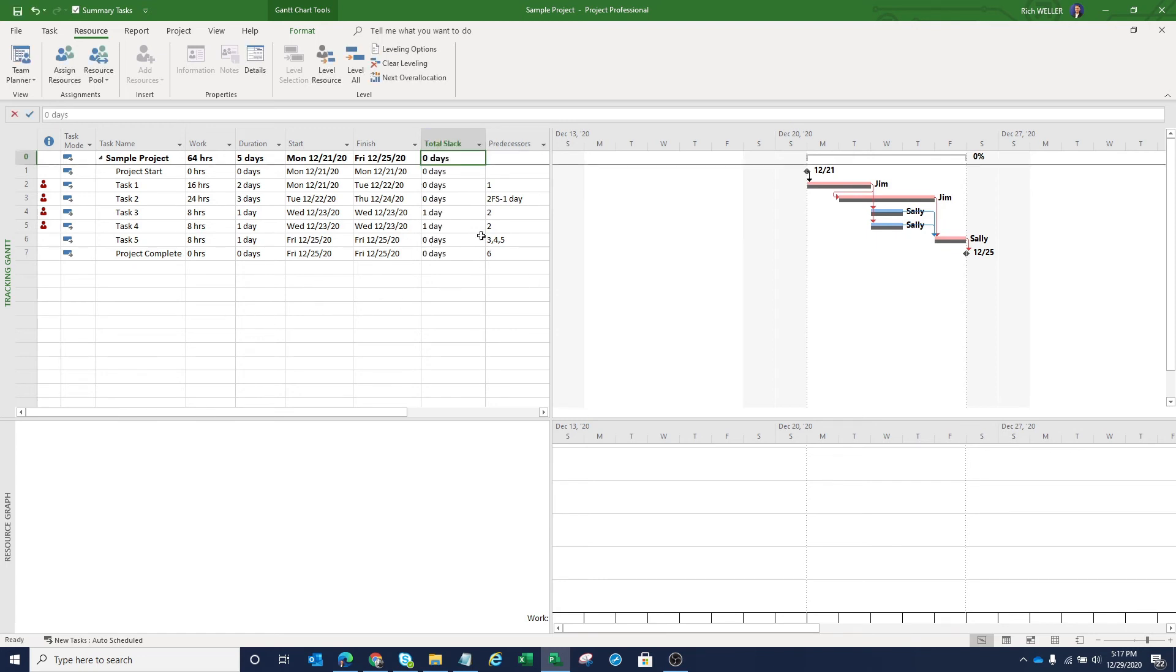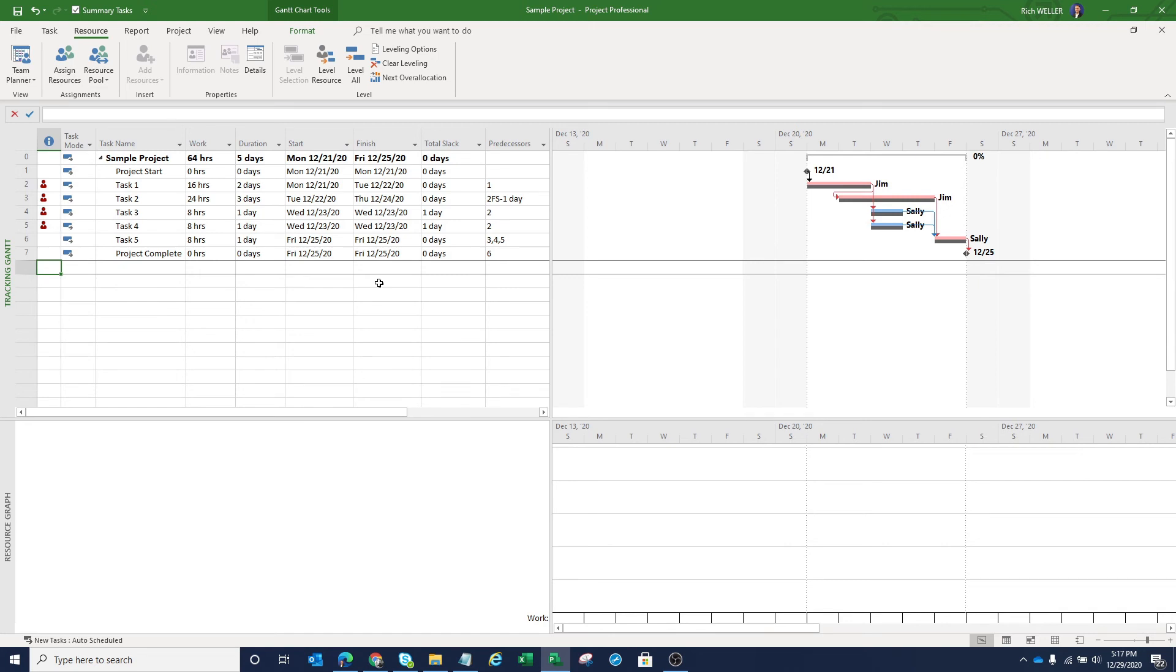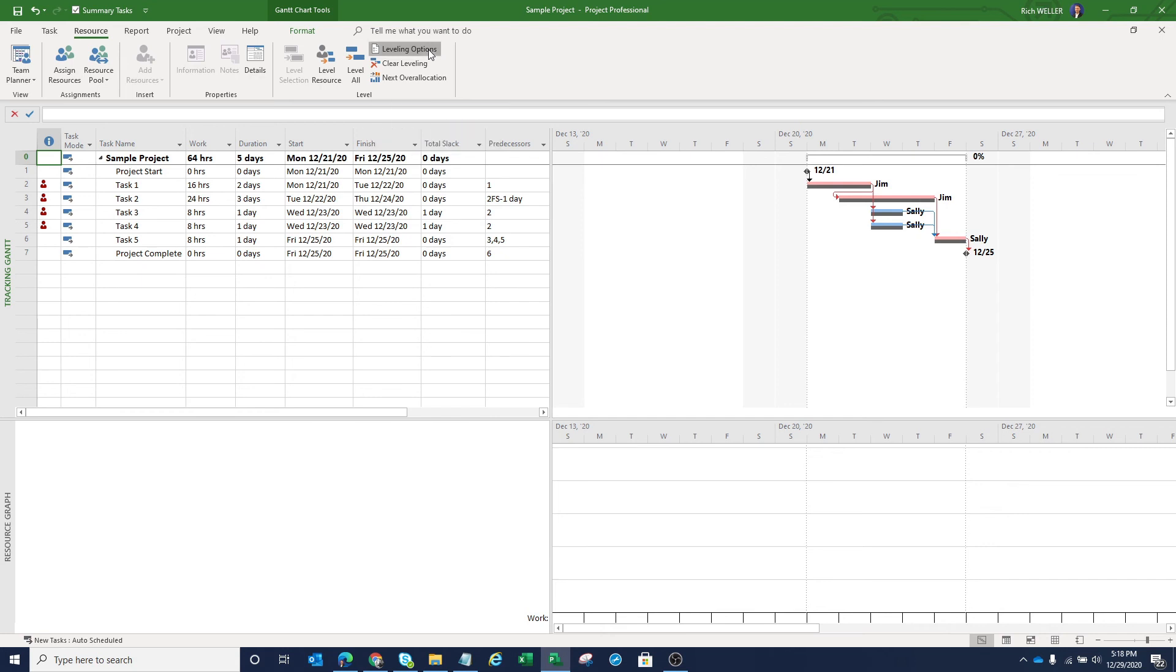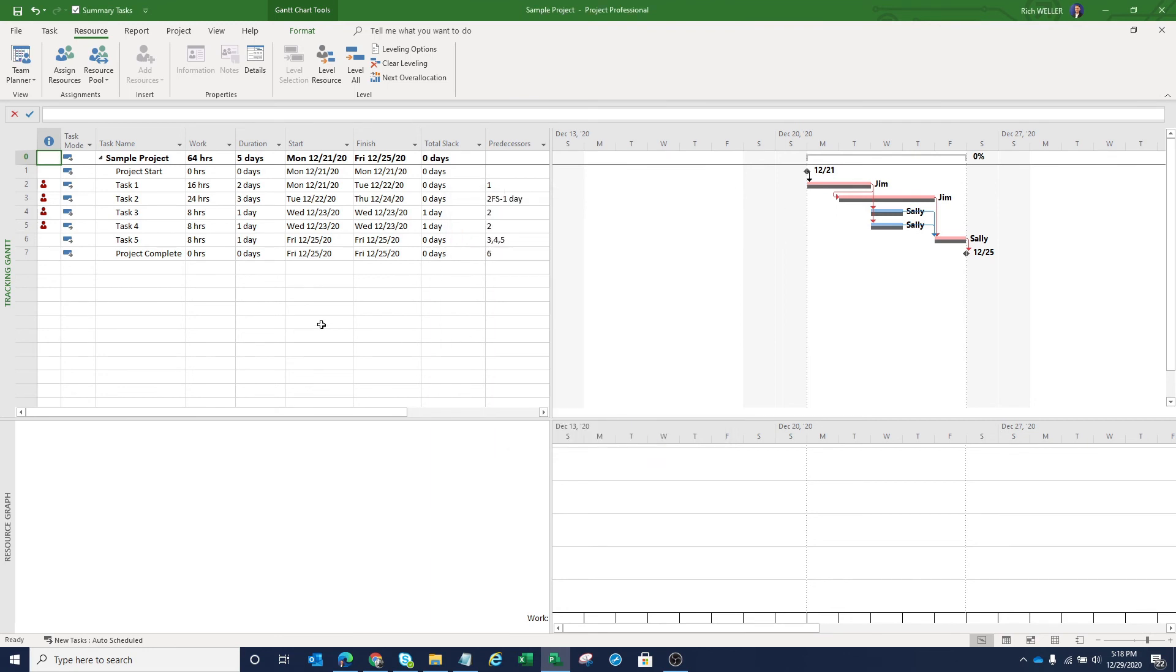And you'll notice that when we look at this column for total slack, there's a number of tasks that have zero total slack, but there's a couple of tasks here that do have one day of slack to them or within them. So what we want to do now is leverage Microsoft project to perform or demonstrate that resource smoothing technique. In order to do that, we first must change an option. If we click here in the ribbon under leveling options and place a little check mark by this option that says level only within available slack. And now click on okay, now we've changed the options.